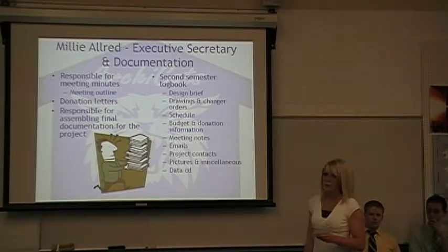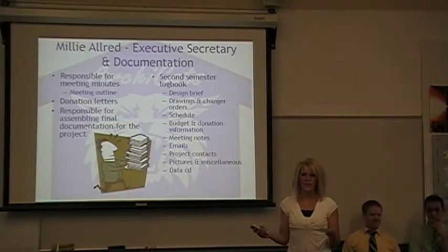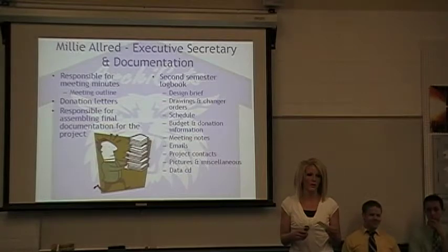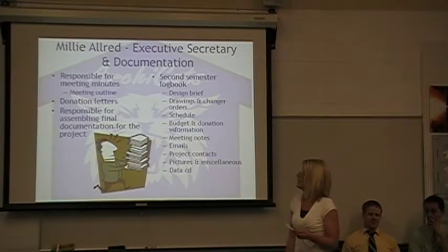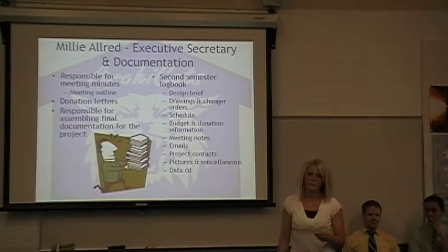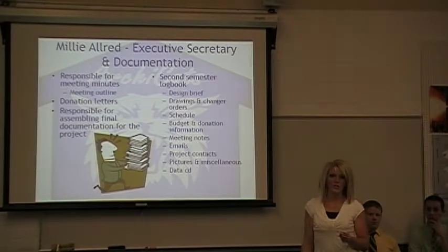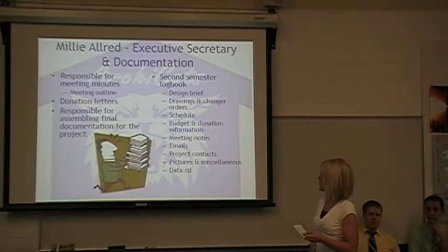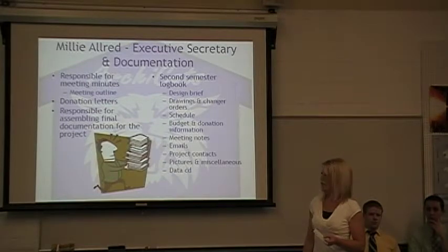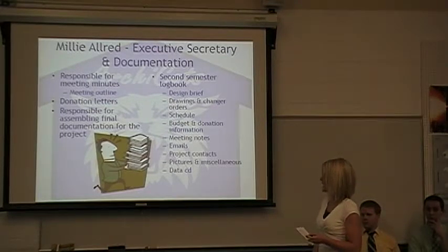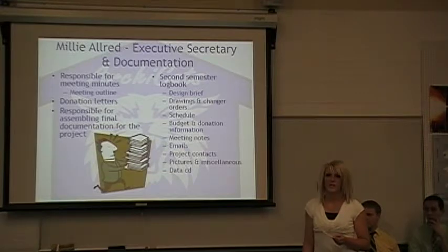Along with the rest of the group, we came up with a donation letter that we could send out to people in order to get some of the items donated. And we also came up with a phone script. I was also responsible for assembling the final documentation binder, which includes the design brief, the drawings and change orders, the schedule, the budget, and all the information for donations, the meeting notes, all the group emails, the contacts, and the pictures, and a data CD.